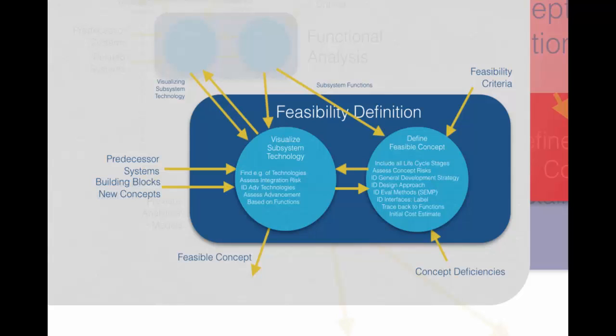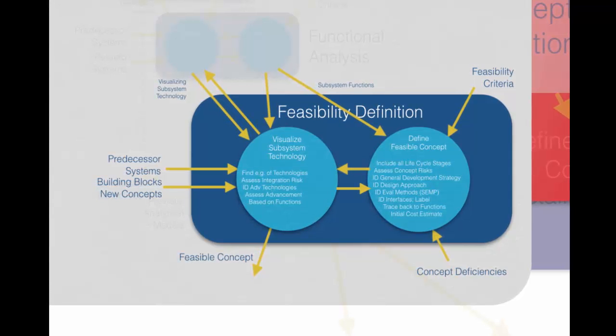Talk to an expert in this field if you're not an expert yourself, to help you identify some of these areas that will require a deeper dive. Make sure that if a technology does exist, it can be applied to the operational conditions of your system. As I stated before, oftentimes a new or existing technology is only used in specific and controlled types of environments. For example, robot arms were designed and developed specifically for manufacturing environments, most of the time clean environments. If they were in extreme environments, they may require higher amounts of maintenance and replacement, and are often outfitted with additional protections from these extreme environments.